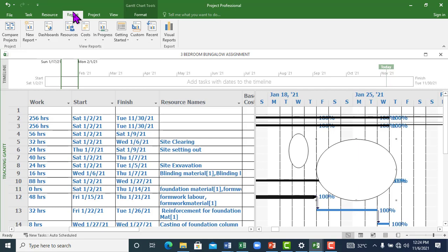It's premised on whether you have updated the progress of work as it goes due. If you have entered your costs initially before you start, and you run a report on cost, for instance, it will be able to give you a cost overview.